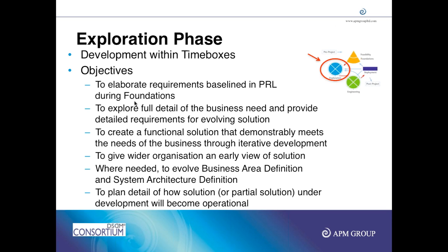And for each increment of 2 months, I have, let's say, 4 time boxes of 2 weeks each. As part of foundations, we create a high level schedule that shows the releases and the time boxes and the scope of features to be released within each release.